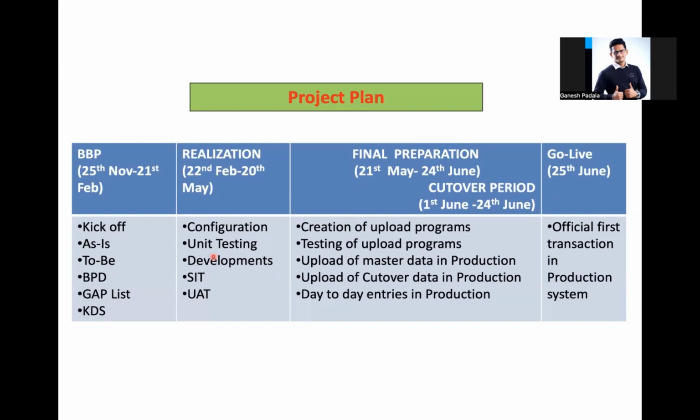And cutover related programs we also have to start making in realization, because in most cases 70%, 80% of data will come during UAT time. So we need those customization things also. This creation of upload programs we can do well in advance, during UAT time also. So testing of upload programs, upload of master data, these activities will happen.